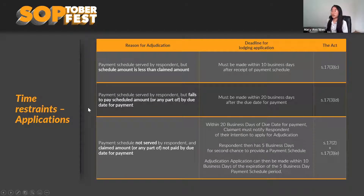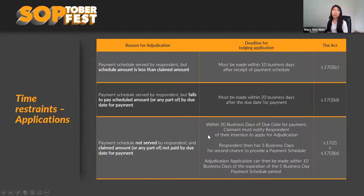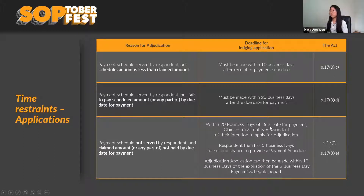Where the payment schedule has been served but the respondent has failed to pay the scheduled amount by the due date, you must make your application within 20 business days after the due date of payment. Where no payment schedule has been issued and the respondent has failed to pay, a section 17(2) notice must be issued first, giving the respondent an additional five business days to provide a payment schedule. You must issue the section 17(2) notice within 20 business days immediately following the due date for payment. After that five business days lapses, you then have an additional 10 business days to lodge your adjudication application.